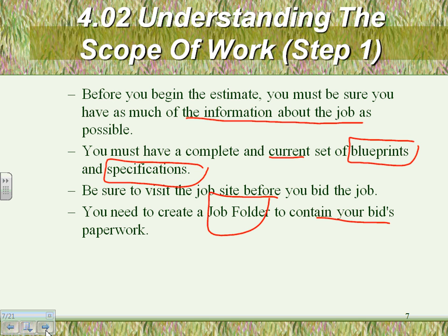I worked for an engineer who had a folder for every job, and a folder in the folder for communication. When he made a call for the client, he wrote down the summary of that conversation and put it right into the communication folder. So if the client calls you about a project five years after you finish it, you pull the information directly from the project. What better than that? And why is this important, guys?